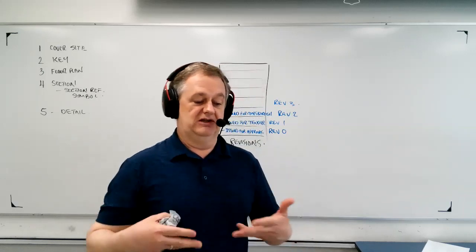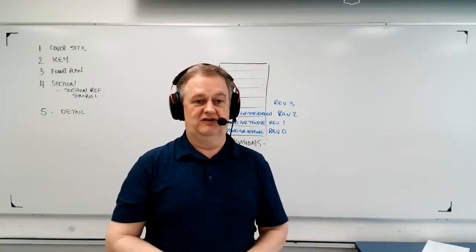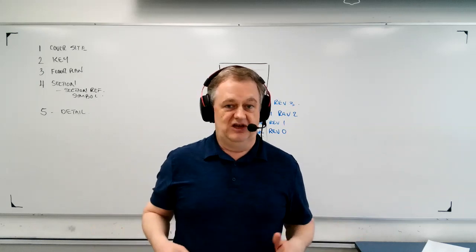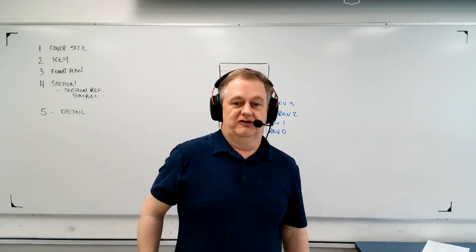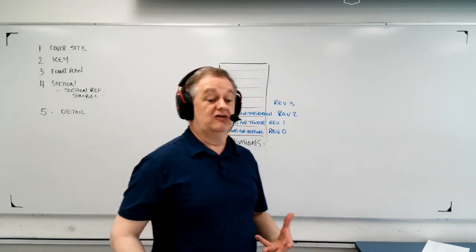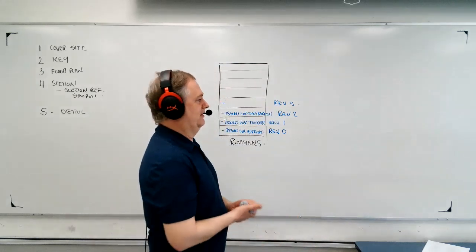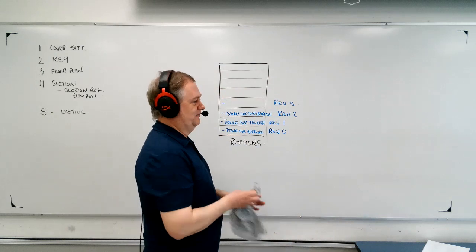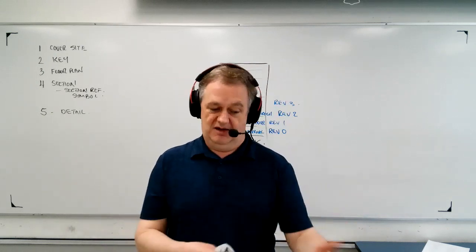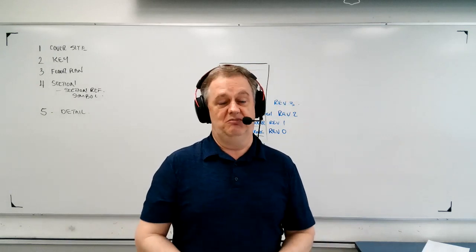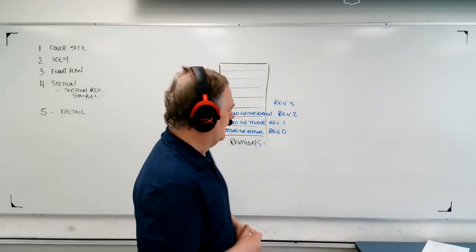And then from the architect, he needs to deliver the changes to the general contractor. And then those changes definitely have to be passed on to the sub-trades and to the people who are actually building the things. And so oftentimes, this is where that chain can break down a little bit, if the communication and moving of any changes that have been made don't happen fast enough, okay?